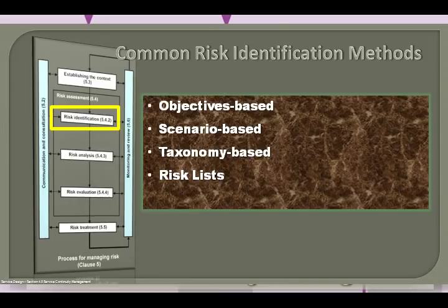Lastly, with risk charting, the above methods are combined. Resources, threats to those resources, modifying factors that may increase or decrease the risk, and consequences are to be considered. A matrix under the headings of the modifying factors enables a variety of approaches to be used.